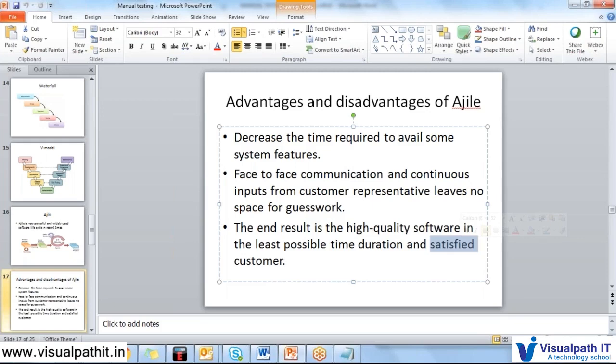After the product is completed, or after 7 or 8 sprints, he cannot say, no, I am not happy with that, because you have agreed with that, you saw that, and you were satisfied with that. So most probably he will not come back later saying he is not satisfied with the sprint one development. If he does come back, it is created as a CR, change request, because you have already agreed. So that is again revenue for the company.